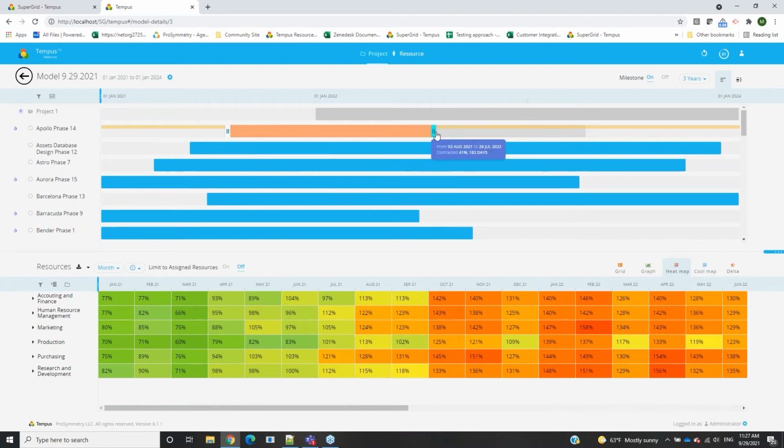And the same thing would happen if we were to expand and increase the duration and move it out a couple months, we're going to still have that 1,000 hours being assigned here. It's just going to instead be redistributed, and it's just going to be less amount of work per day than initially asked for. However, we also have the option for a fixed percentage.